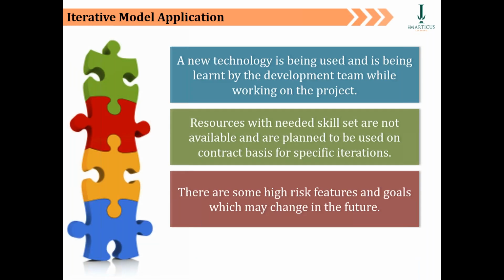While you are in iterative development, which means you discuss with the customer something on a new requirement, you bring it over, you develop it. Then you do the next discussion on the next level of requirement. So these are iterations between you and the customer. We call it an iterative model, as you've understood. When is this model applicable? Number one scenario, when a new technology is being used and is being learned by the development team while they are working on the project. Because you're doing it in smaller iterations, it's better to use this way of development.